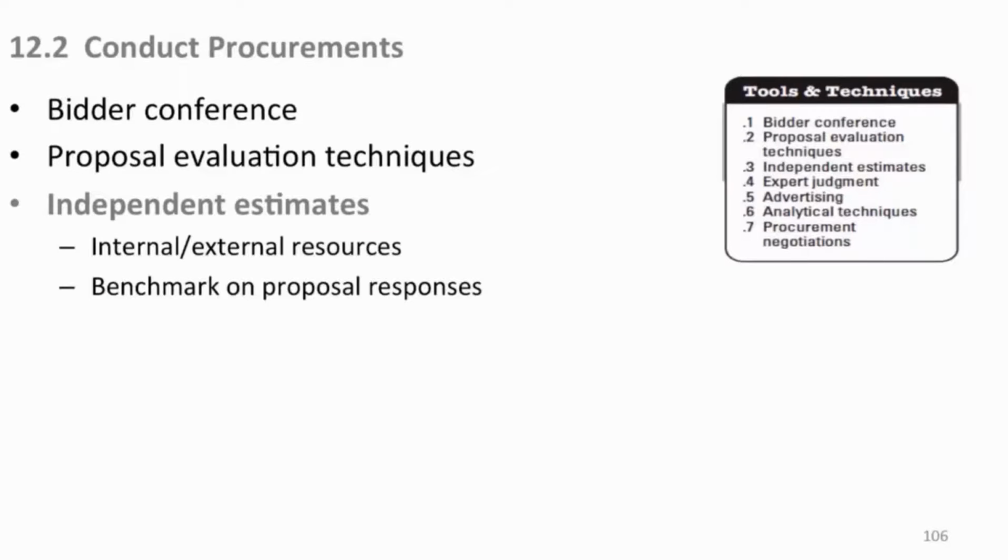Well, we put quality in it, all these inspections, so their cost of quality is way up in their organization. But if they can't sell it at that price, then it's lost money because nobody's buying their product. But it may not even be quality, maybe something else. When you get that disparity, you really do want a sanity check, a benchmark on the general price frame we're looking for. Things that are way out of whack, you really need to question.